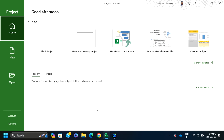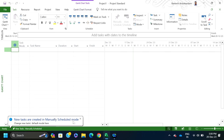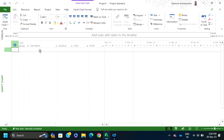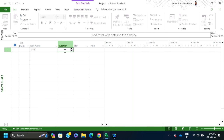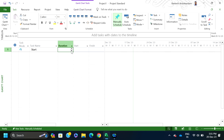I have opened MS Project and selected a blank project. On the left side you see task mode, task name, duration, start time, and finish time. I will start with the start node — task name 'Start,' duration 0 days — and specify the starting date using the calendar dropdown. The second task name is A with a duration of 5 days.